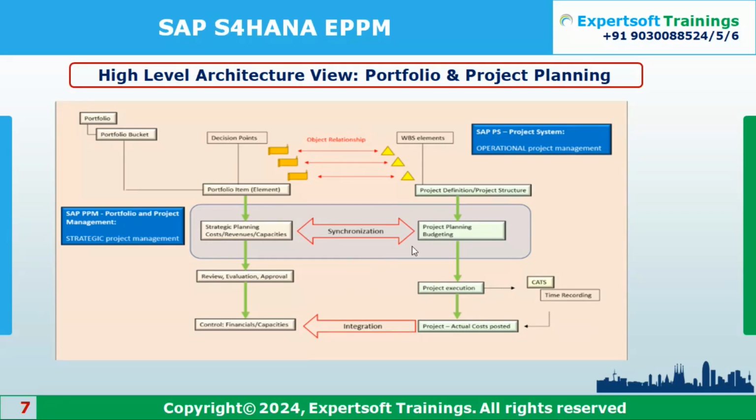So that structure, the cost structure, you also need to define. There are different types of cost planning structures we have. As per the business requirement, you have to define, maybe travel expenses, procurement expenses, any further expenses, how much revenue you're getting, how much you have planned. So it will show you plan versus actuals. It can be monthly, quarterly, half yearly, yearly, or a 5 year plan.